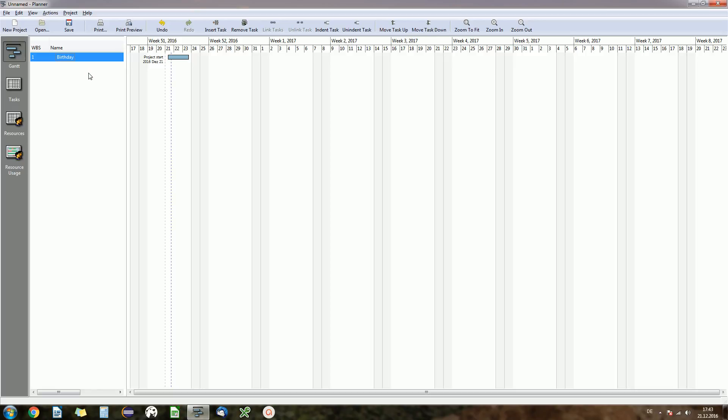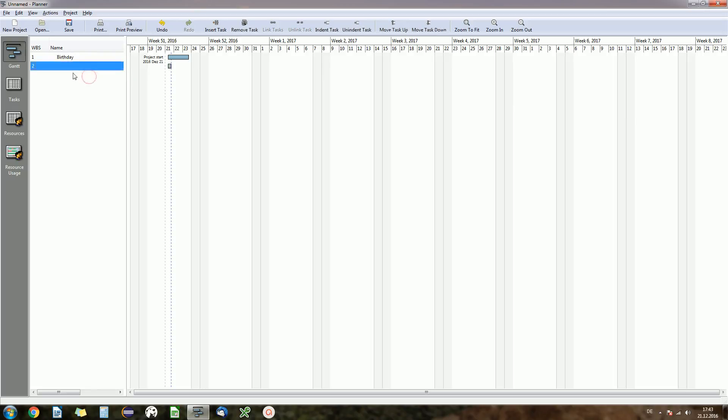Now what's more interesting is if you have tasks related to each other and subtasks. So let's say one step is buying a birthday present. Now we can say that is part of our task birthday, and to make Planner realize that we want to indent the second task.